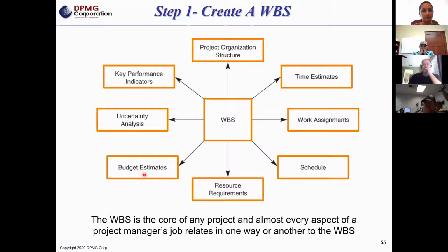The risk analysis, the work breakdown structure is going to start giving you at a detail level where that potential risk, where in that work do we have the greatest risk? And then once you put that on a timeline, you're going to see when, based on the work breakdown structure, you're going to have the greatest risk on your project.